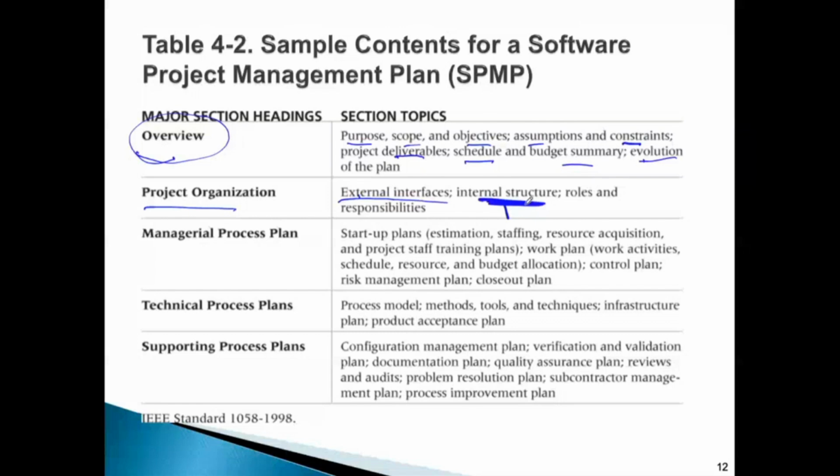If you have material, how you're going to dispose of the waste, how you're going to hand over the system or the products to your client or the sponsor. And the rest of the closing plan, for example, lessons learned: where you're going to write them, what you're going to include in them, where you're going to document them, who's going to review them, these things.